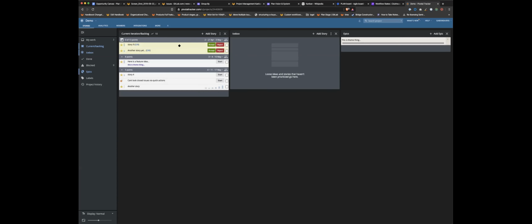And what's nice about it is that it ties together my epics in one view. So if I link all these issues into my epics over here, all I have to do to know when an epic is going to be done is hover over this. And based on how I've prioritized everything in this list, it's automatically going to tell me the date, right? It's easy for engineers. They can't start an issue until they put a story point or an estimate on it, which forces you to have a conversation. So it forces you at different points to have conversations about things. And then it always prompts me.